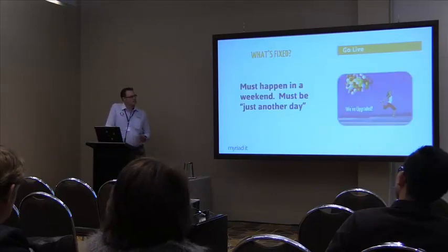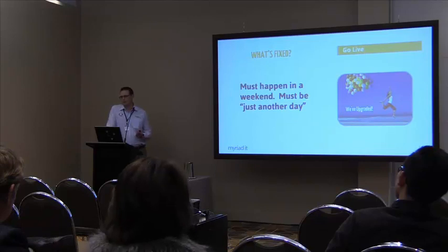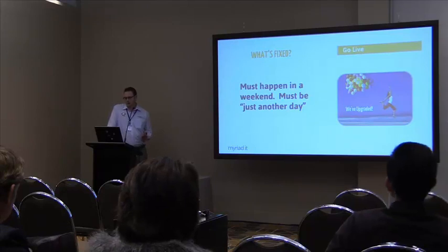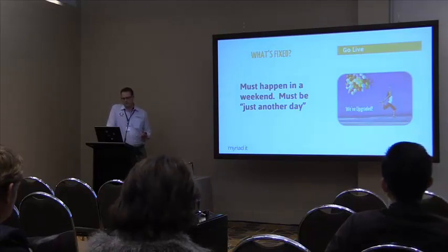Go live. Pretty much, this must happen in a weekend for the majority of people. Depending on their businesses, they may have a small window, or a 24/7 operation. But the majority of go lives you can get done within a 72-hour frame.